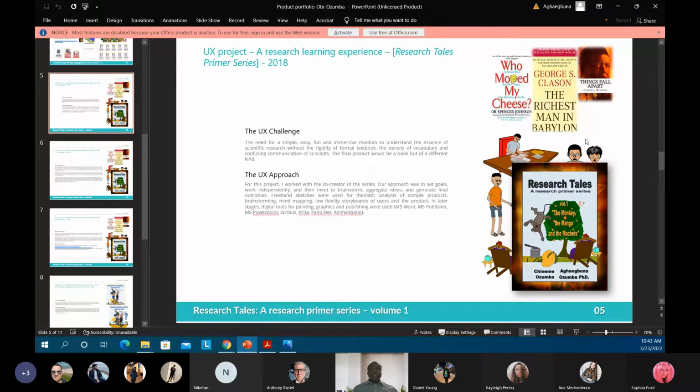And once I determine who I'm serving, who I'm selling to at each point in time, I build that into my project management. So my main focus at this stage is to meet these milestones that sell to this particular stakeholder group, and that gate opens for me to move forward.